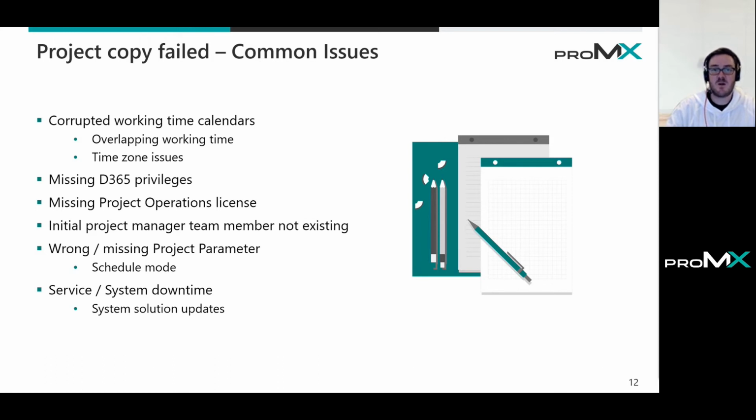We have a complete overlapping time zone setting in the project, and then it's important that we also check the working time of the resource. From time to time, as I said, they get broken, and it's best practice and very easy if you simply recreate the calendars for the resource and apply them to the resource and the project. So it will then get updated and hopefully correct the issue.